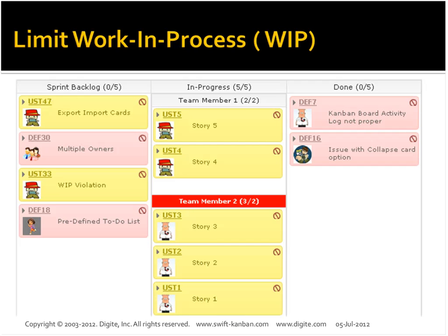The impact it has is, first, they will not be multitasking, because if they end up multitasking, the whole focus of doing a particular thing at a time will get lost, and there could be potential poor quality that creeps in. Also, if they are doing too many things at a time, there is a certain spike in the next team.